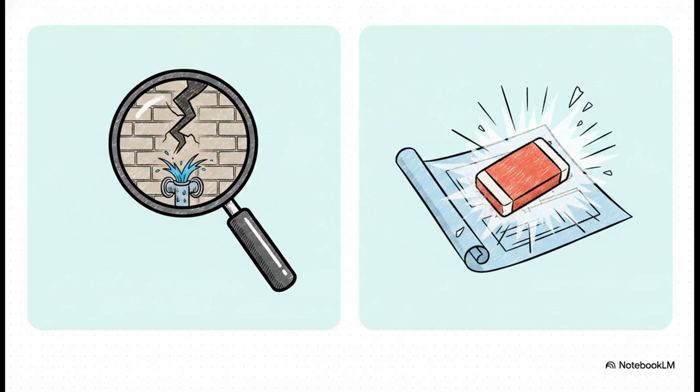Late-stage design changes, however, modifying plans after they are finalized, that wreaks absolute havoc on a budget, and it is entirely preventable. Both require proactive early assessment, but those late-stage design changes require strict, ironclad internal discipline.